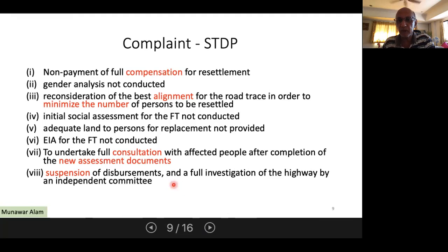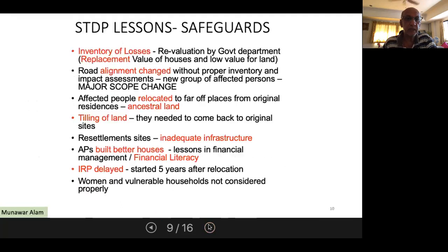So these were also claims of the contractor of not being allowed to work because the government has to provide unencumbered land to the contractor, and all the land should be provided ideally at the beginning, but then they can stagger where the contractor has to work, according to the work program which was approved. So these were the issues, and at many sites there was violence also, and the protesters were not allowing even ADB missions to go to the sites or even to talk to them, because they just said that their complaints had not been addressed properly.